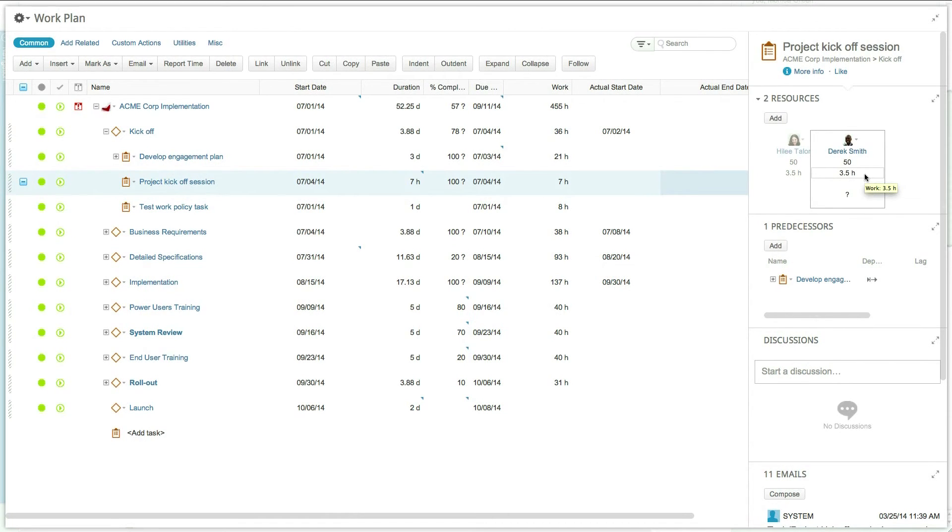In this case, the task work will get calculated by summing up all of the resource's work.